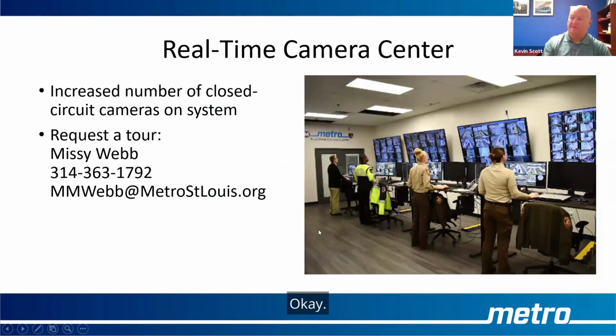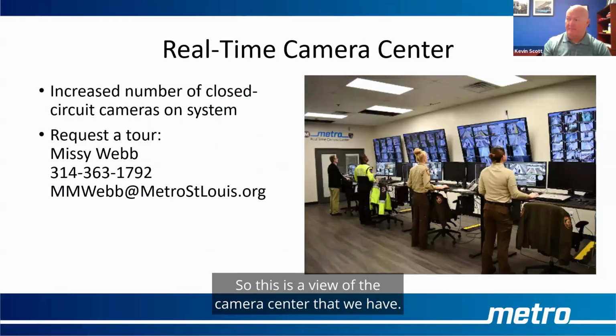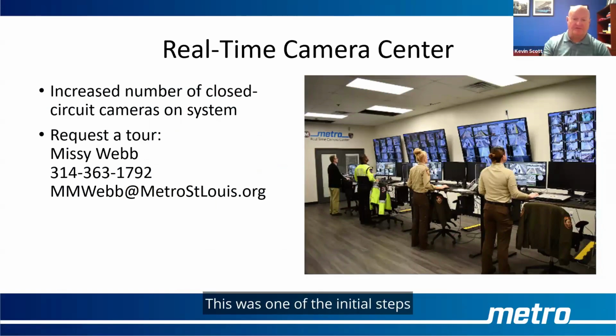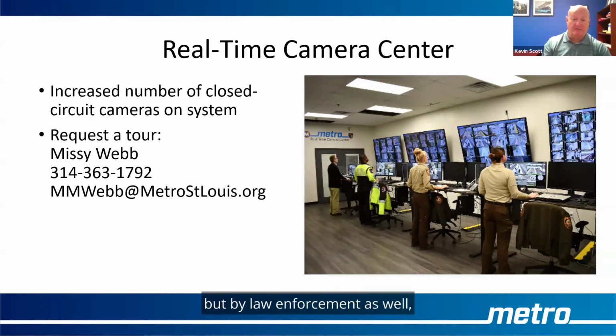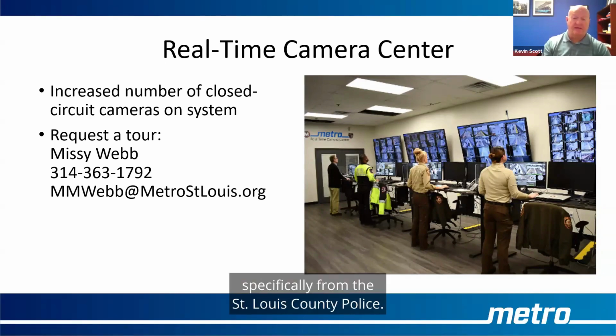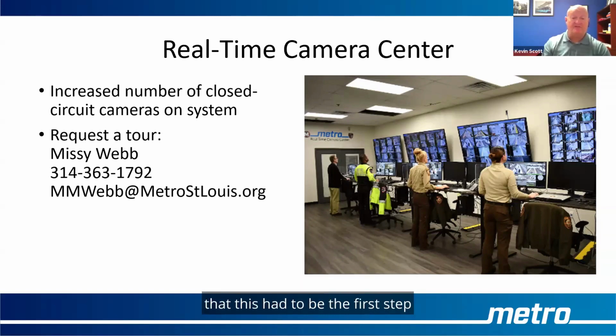Okay, very good. So this is a view of the camera center that we have. This was one of the initial steps or the initial processes in the closed circuit or the SPP program. It is staffed 24/7, not only by Metro Public Safety, but by law enforcement as well, specifically from the St. Louis County Police. And the big difference is that this had to be the first step in the SPP project, because in essence, this will become the control center if the gating systems that we're putting in need to be overridden by our staff.